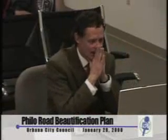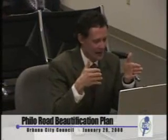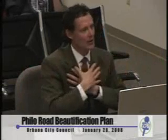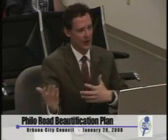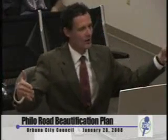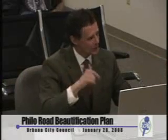I would also say, on the 30%, you have to understand that it's conceptual. We've taken an area that's approximately 400 feet long, and we're trying to associate costs to an area that's 900 feet or 1,200 feet long. So until you allow us the time to actually work out the details and finalize, we have to put in a contingency of that large amount. Now, I know Bill said that traditionally, when you put a $700,000 budget down, that's what the budget is. I would like the leeway to at least get this concept into the full corridor from Florida to Colorado and start really figuring out what exactly we're talking about as far as cost. I don't think we'll really know that until we get into the next stage of design.